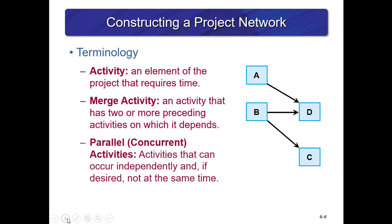Important terminology for this chapter: an activity is an element of the project that requires time, shown by a box with a letter on it. A merge activity is an activity that has two or more preceding activities on which it depends — D would be considered a merge activity because it has predecessors A and B leading into it. This also shows parallel and concurrent activities, which can occur independently and not necessarily at the same time because they have no dependencies on each other.